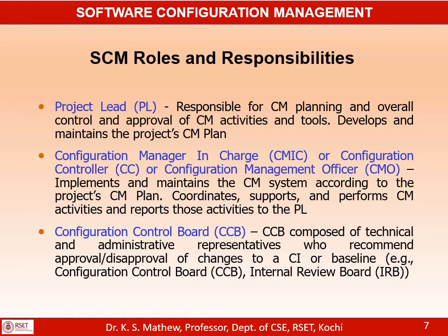This is a body which is responsible for approving or rejecting change requests. The CCB is composed of technical and administrative representatives from various departments like project, marketing, finance, who recommend approval or disapproval of changes to our product or baseline. The CCB is responsible for approving the change request so that the project manager and the leader can go ahead with implementing it.